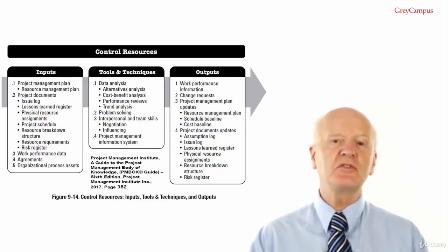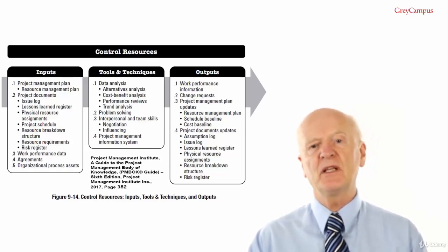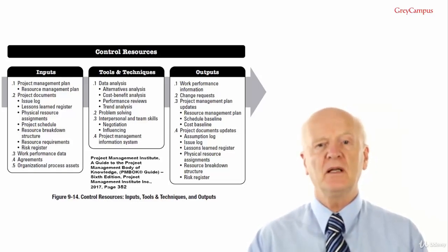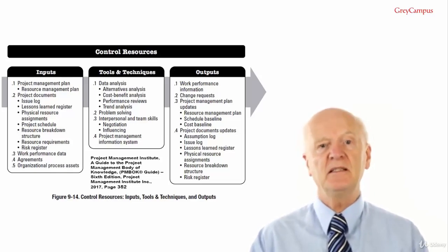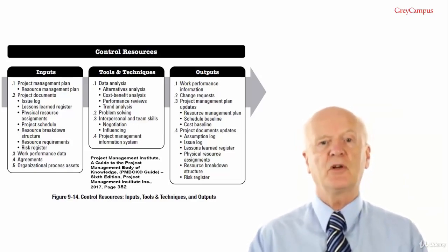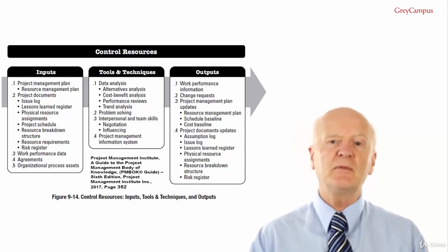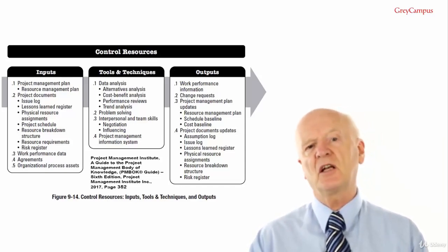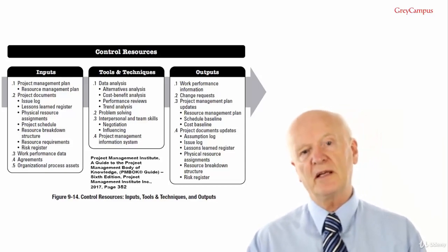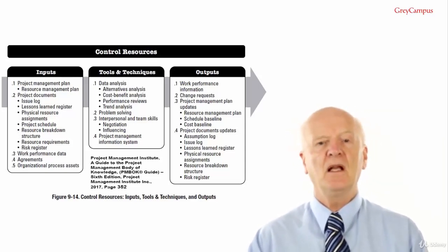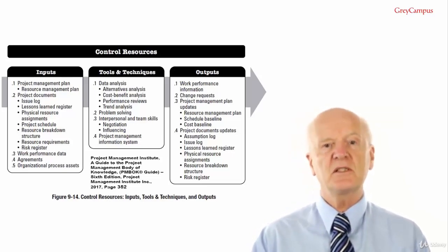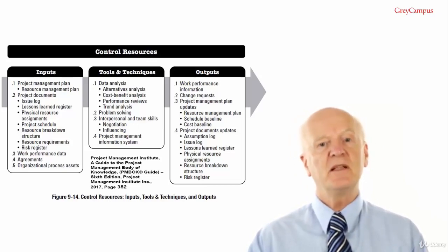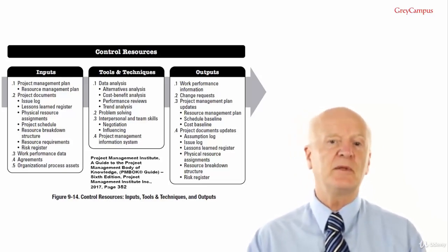The project manager should use methodical steps to deal with problem solving. These can include: identify the problem; define the problem, which means break it into smaller, manageable problems if possible; investigate, which means collecting data; and analyse, find the root cause of the problem. And remember, for the exam, when you see root cause, you should always think of Ishikawa, fishbone, cause and effect, or Ishikawa diagram. Solve. Choose the suitable solution from a variety of available ones and check the solution, which means to determine if the problem has actually been fixed.